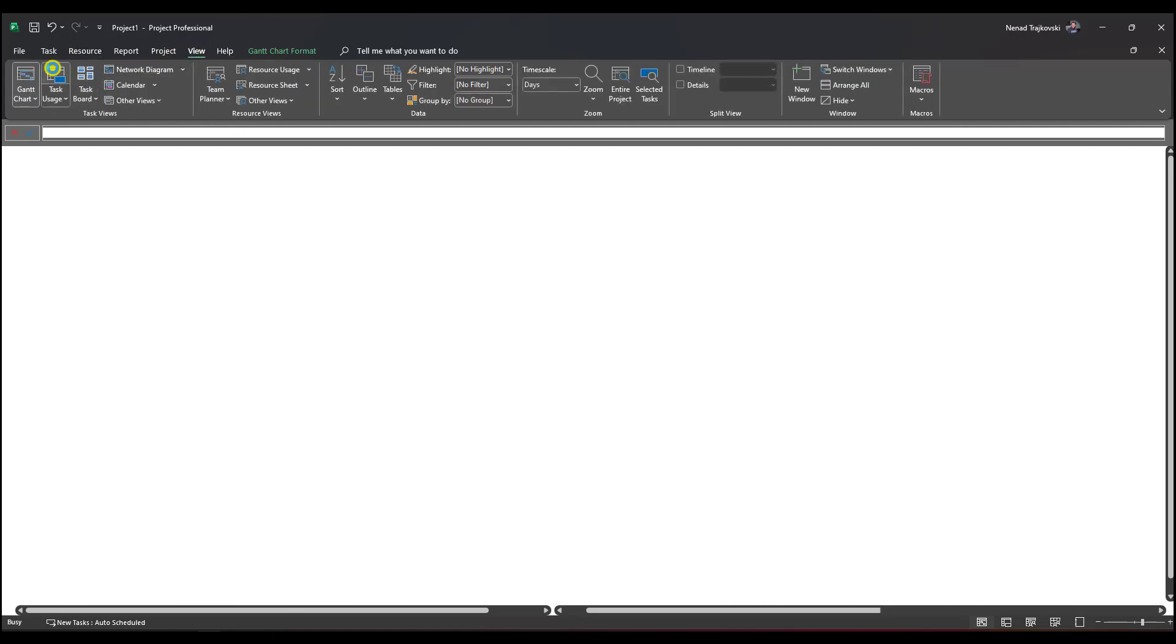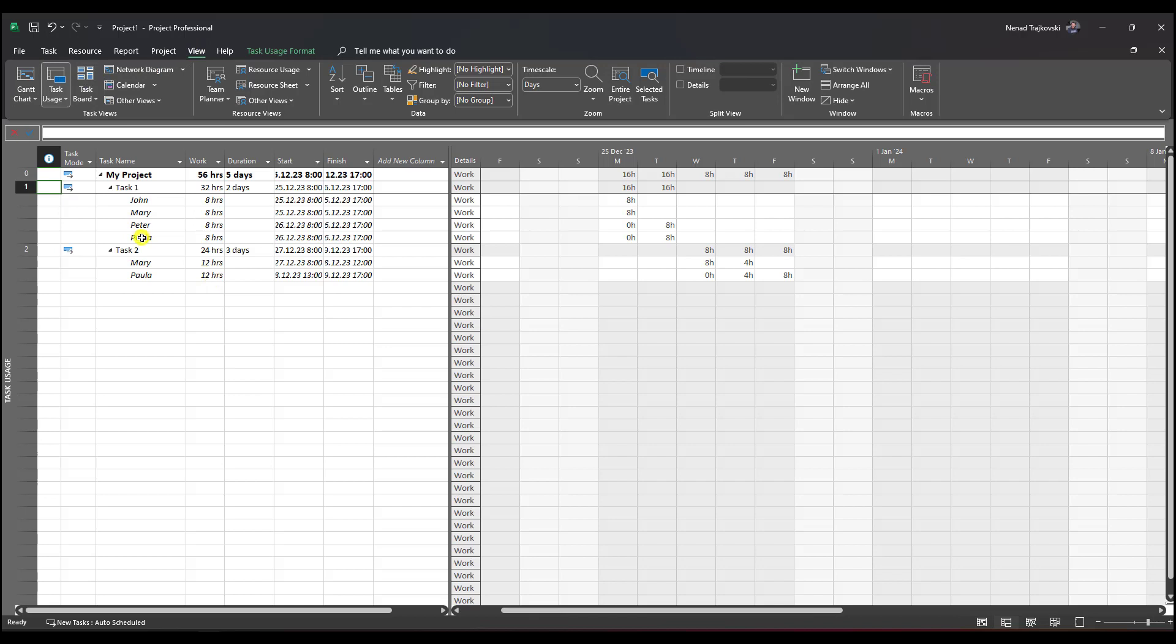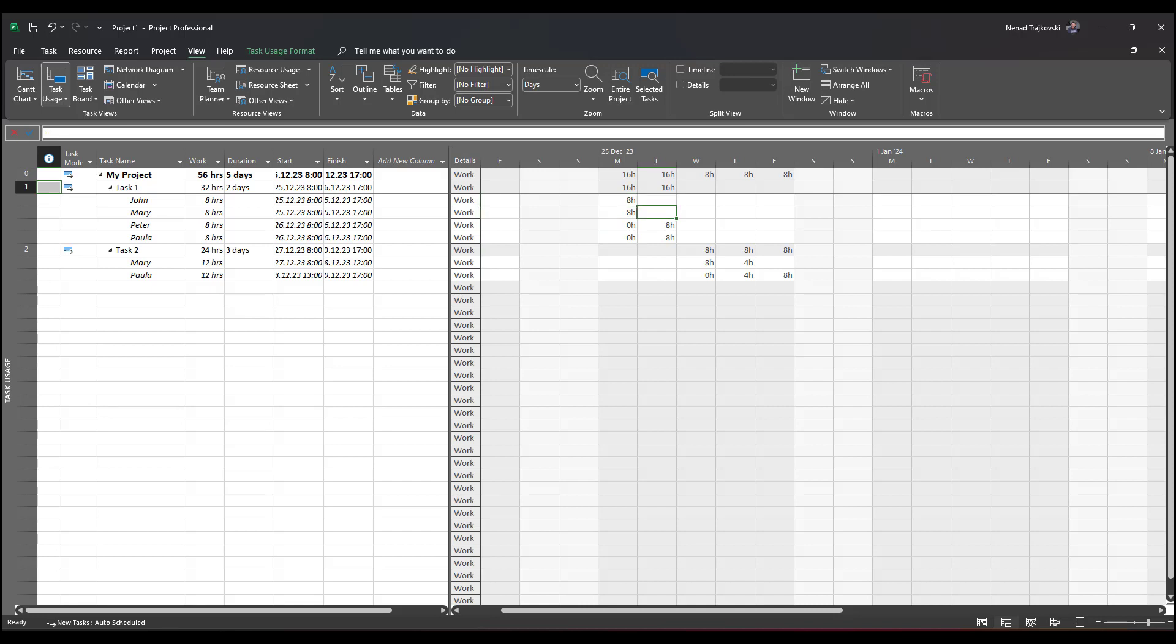Let me go to task one. You'll see that on task one, which is two days duration and 50% done, John and Mary did it on day one. On day two, John and Mary are not assigned, but Peter and Paula are for the rest of the work.